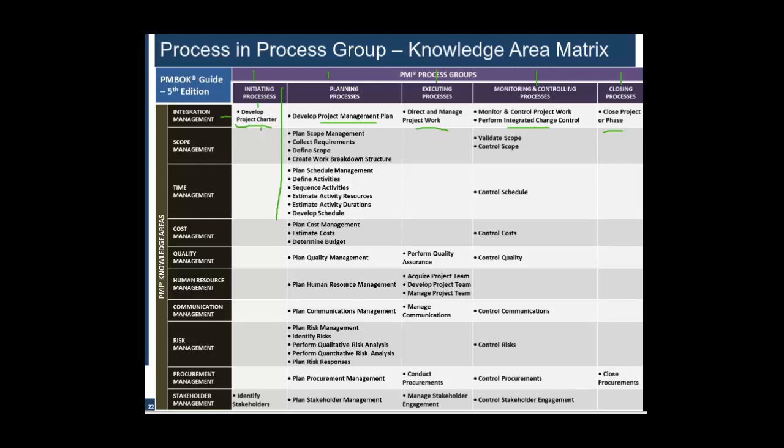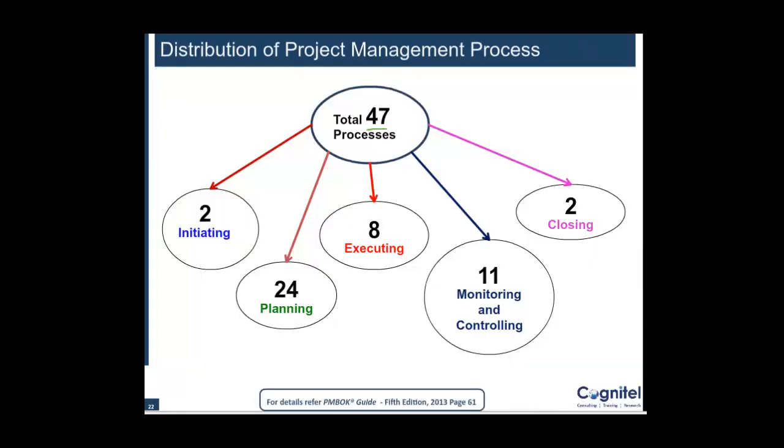Every knowledge area is contributing to the Planning process group. Similarly in Execution, there are quite a few processes, then in Monitoring and Controlling, and then in Closing. We would be looking at this matrix before we start any process to see which knowledge area and which process group it belongs to. In total there are 47 processes: 2 belong to Initiation, 24 to Planning, 8 to Execution, 11 to Monitoring and Controlling, and 2 to Closing.